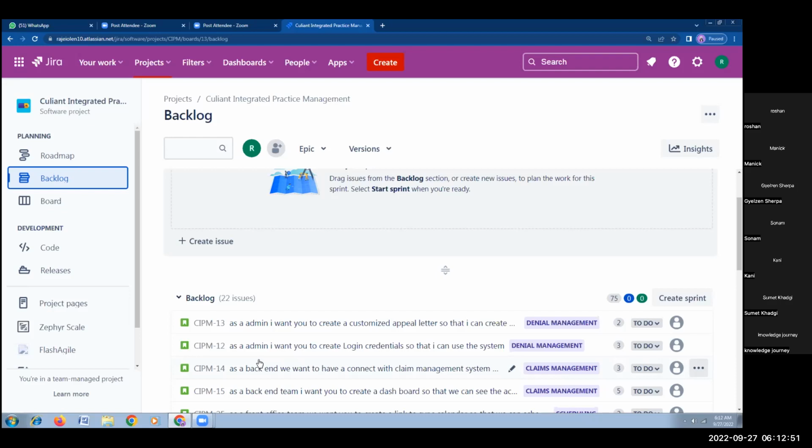How many sprints? Normally in one release, it may vary between 5 to 8 sprints, roughly speaking, sometimes almost three sprints. It may go up to 5, it may go up to 8 even. If we have a long release duration, let's say around 4 months, you may go up to 8 sprints. Otherwise, on average, 3 to 5 sprints can be done.